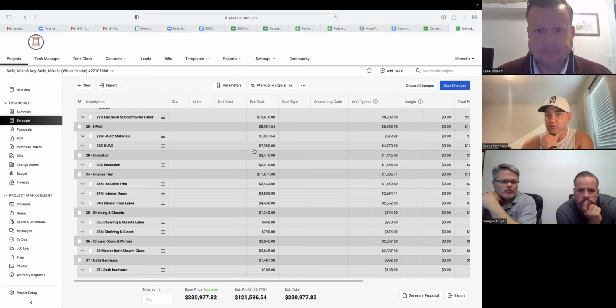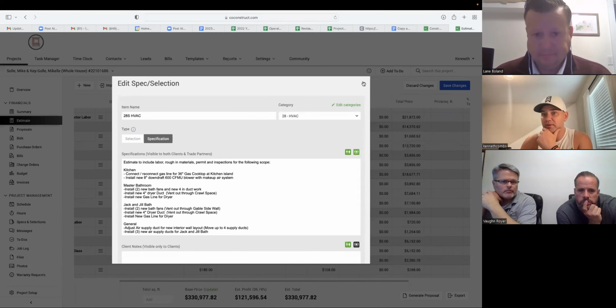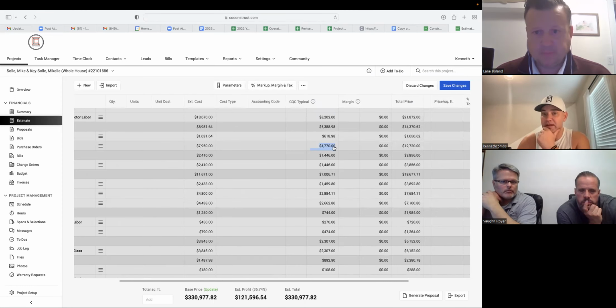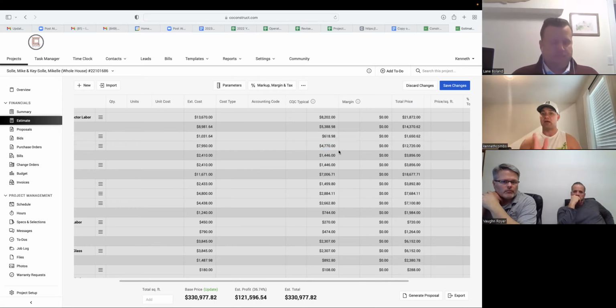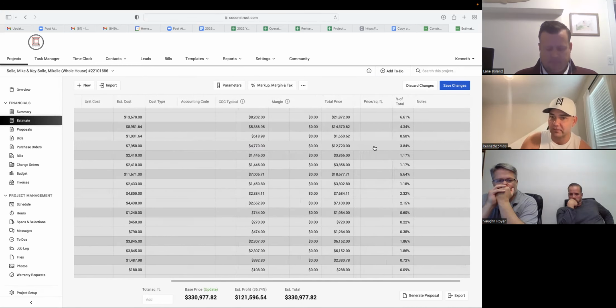And so this is what we can spend. This is what our estimate is. This is how much we spent so far. So when they do their WIP, they're going to see the PM, again, they've got 7 jobs going on, but they're going to see on this job, okay, $4,777 has been spent. What's been done? They'll know if the rough-in's been done, so they'll put 2 and 2 together and say, okay, that's what they got paid to do the rough-in. There's still the balance of their contract to get paid after the trim out. So in the WIP, we're still projected to be $7,950 of what it's going to cost. So there'll be a 0 net up or down on the WIP. And then over here, it's just our total price to the client, retail.